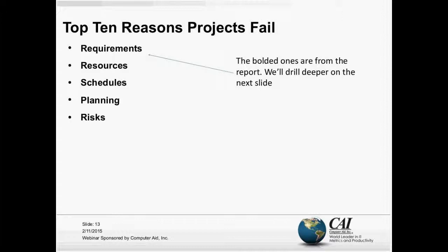But here are the issues. Requirements, and I'll drill deeper in the next slide. Resources. So what are the requirements of the thing I'm making, or the service I'm providing? First of all, people don't even understand what a requirement means. Do you know that a date is not a requirement? If your manager says, I require this service by September 15th, that's a constraint. It's not a requirement. And then when I talk to people, and no disrespect to the business analysts who might be on the phone, they don't know how to gather requirements, and the customer doesn't know how to articulate them.